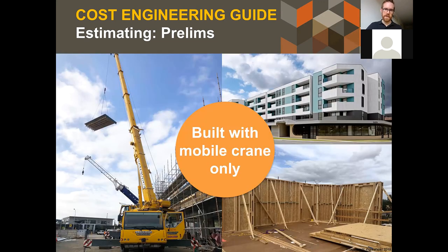A good example of this is Alia. This is built in Melbourne's north. It's a five-storey stud frame multi-residential project. And you can see right here, that's a mobile crane, which is just picking up a floor element and dropping it in on site. This is, as I said, a stud frame, so it's a lightweight solution. And that's actually a floor cassette, which is being picked up by the crane. So with those floor cassettes, they can install a very large area per day.